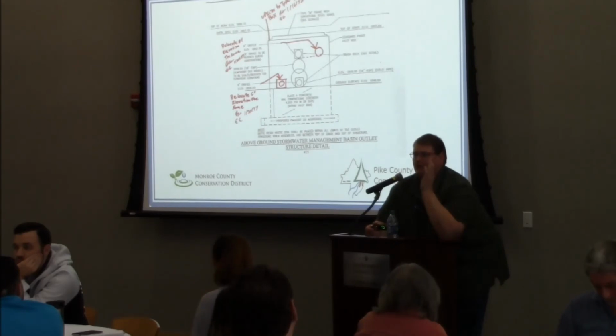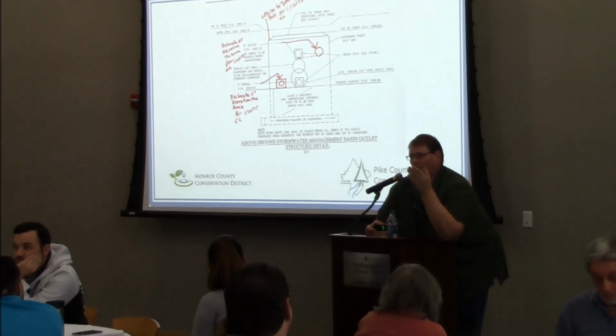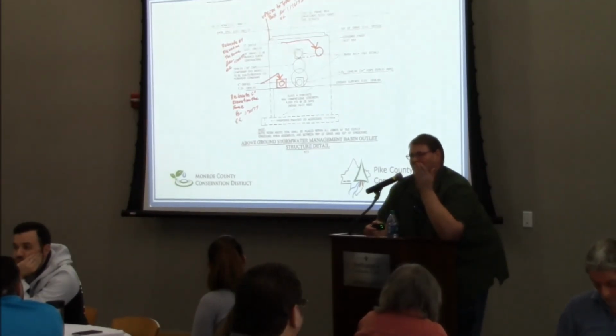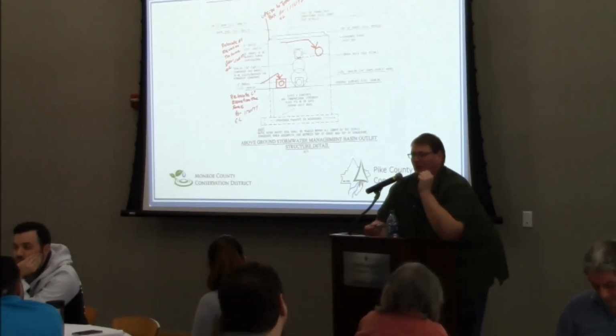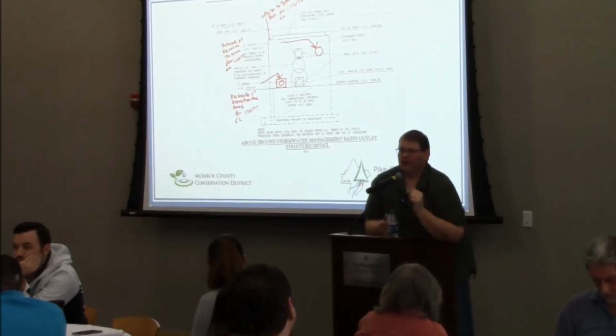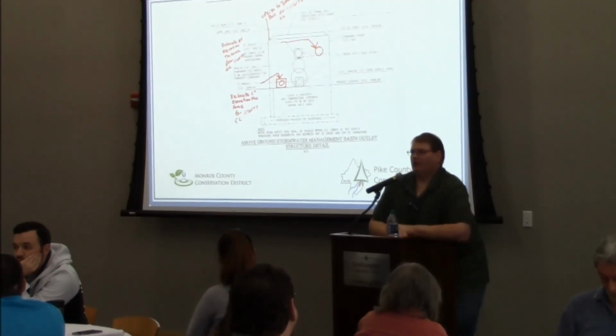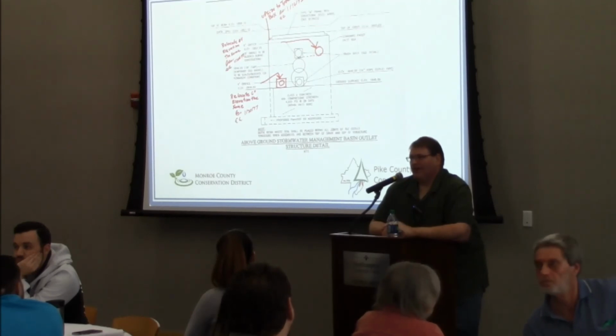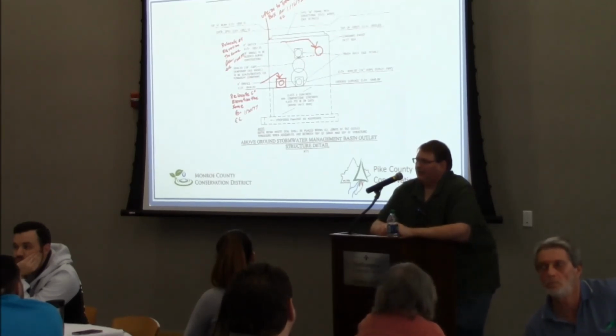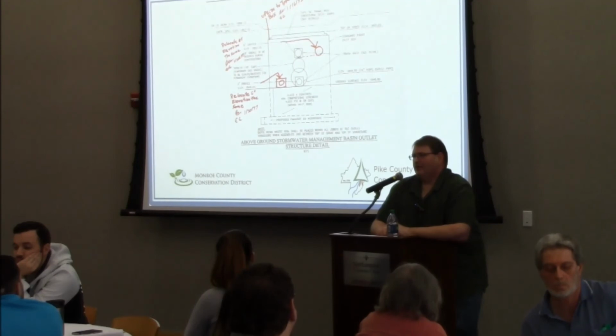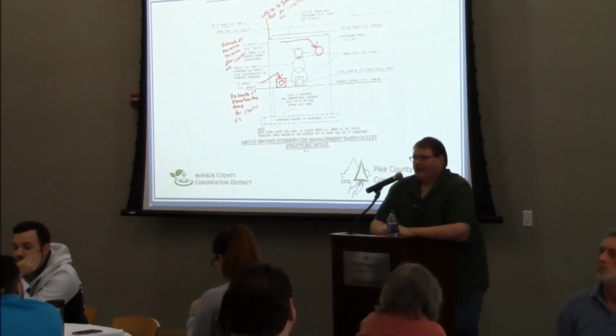So shifting, for instance, the plate over, as long as there's a hole behind it, you can certainly shift that plate over. Without the hole, it would be a moot point. Or, they may have a larger diameter discharge pipe that wasn't considered, and you might need to change the box from a standard box to a type 4 that's expanded to accommodate the discharge pipe. Things like that would all be considered field changes in red lines.